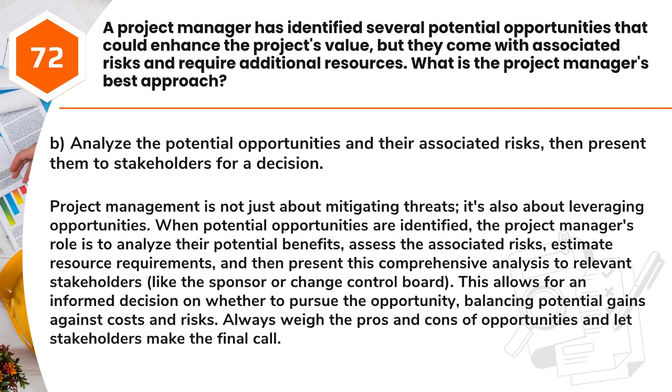Answer: B. Analyze the potential opportunities and their associated risks, then present them to stakeholders for a decision. Project management is not just about mitigating threats, it's also about leveraging opportunities. When potential opportunities are identified, the project manager's role is to analyze their potential benefits, assess the associated risks, estimate